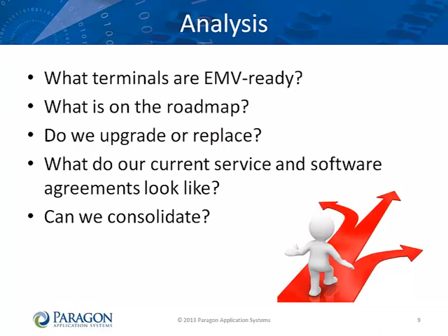As you take inventory, you may discover that some terminals have already been upgraded or replaced as part of another project, such as ADA, and may now contain many of the components needed for EMV. Find out what terminals may already be scheduled for other upgrades or replacement over the next few years. You may want to use the EMV migration project as an opportunity to do that upgrade or replacement.